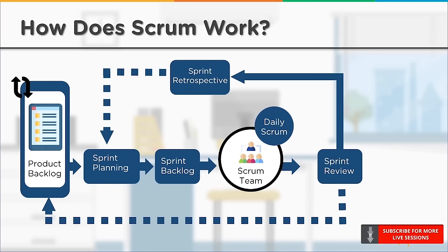The product backlog is presented to the stakeholders so that the product owner can get some feedback for upcoming sprints. Then, there's also the sprint retrospective. During this meeting, previous mistakes are identified and new ways to handle them are determined. The data obtained from this meeting is also used while planning the new sprint. And finally, we have increment. In this stage, a workable output is provided to the stakeholders. After this, another sprint starts and the whole process is repeated again.